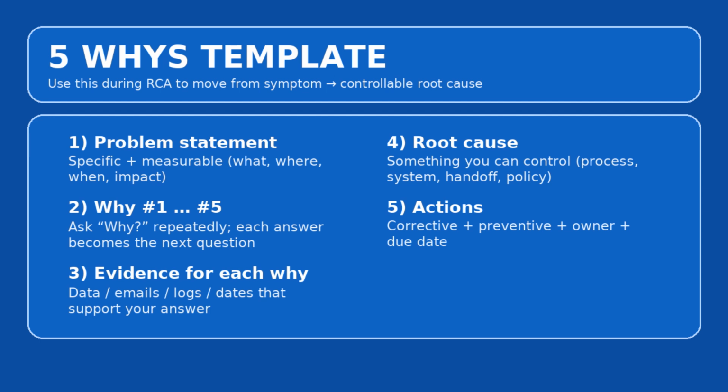System testing started 8 days late versus baseline, which is August 10th, and the actual is August 18th, putting go-live at risk by 1 week. This is the problem statement. Avoid vague terms like "we are behind."